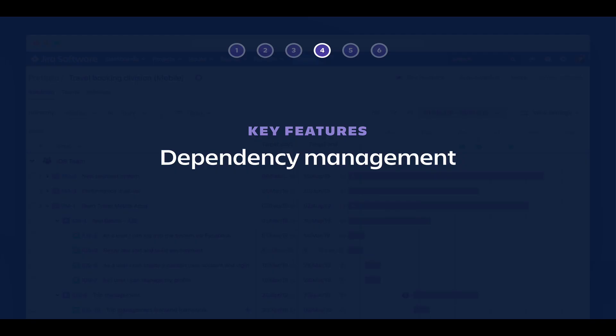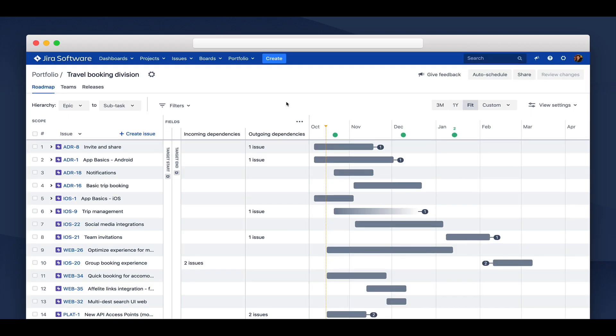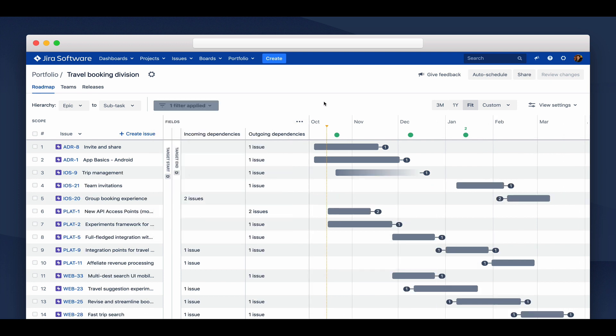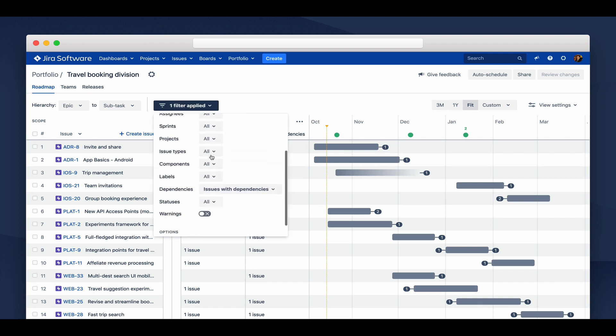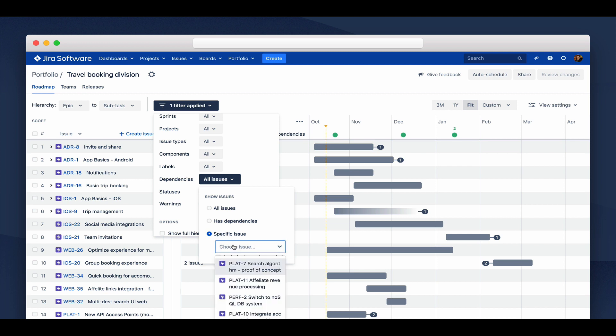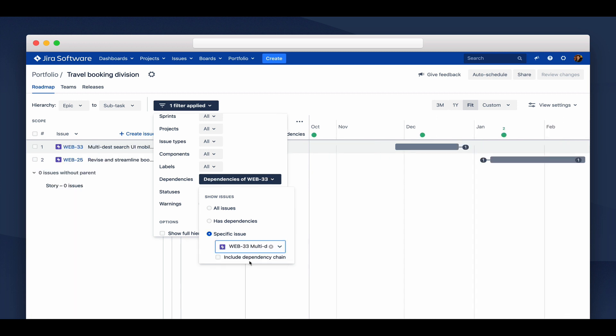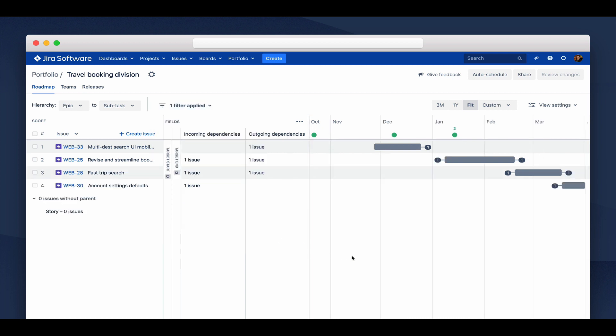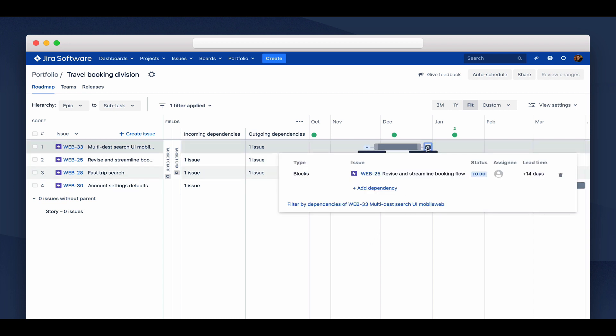Next up is Portfolio's improved dependency management capabilities, which helps you instantly surface conflicts early before they derail your plan. The numbers you see in the timeline represent dependencies on the issues. A dependency at the end of an issue means that it's blocking another issue. A dependency at the start of an issue means that it's being blocked by another issue. Let's filter for all the issues in our plan that have dependencies, so we can isolate all the ones that have either a blocking or blocked relationship. We can quickly identify scheduling problems from the color of the dependency marker. If a badge is red, it means there's a conflict, that a blocking item overlaps with the start date of a blocked item. Now we'll focus on a specific issue in the web project. We can filter for the dependencies of that issue and choose to see the entire chain of interdependent issues that is related, meaning if you have a situation where A blocks B, B blocks C, C blocks D, we'll surface all the issues in that chain. This allows you to quickly identify and resolve scheduling problems before they become a nasty surprise.